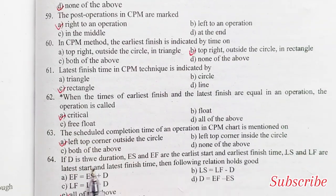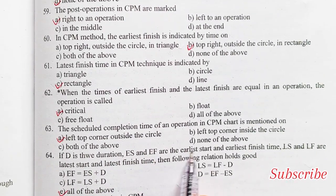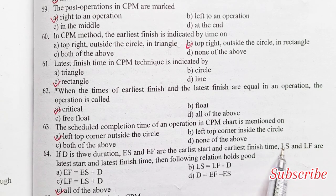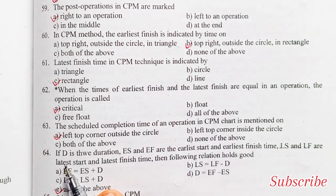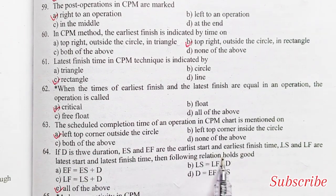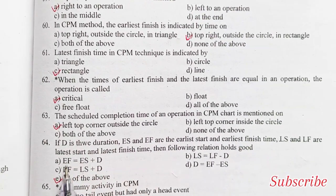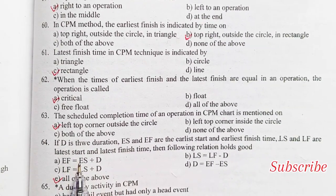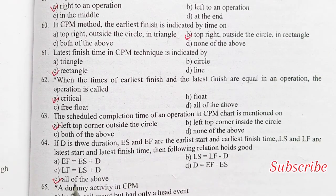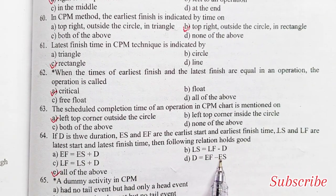If D is the duration time, ES and EF are the earliest start and earliest finish times, then the following relations hold: EF = ES + D; LS = LF − D; LF = LS + D.